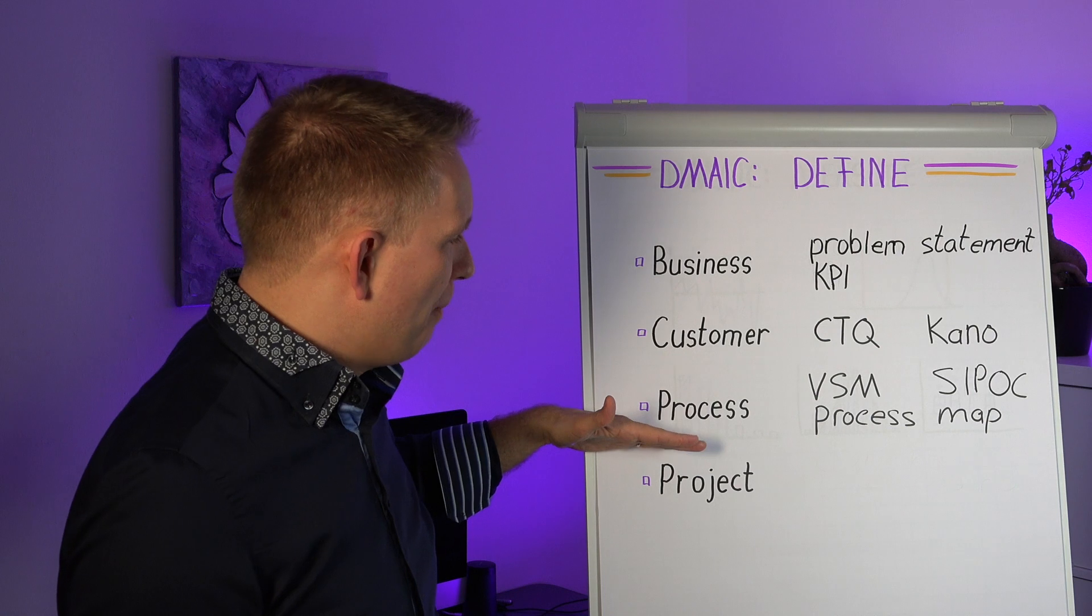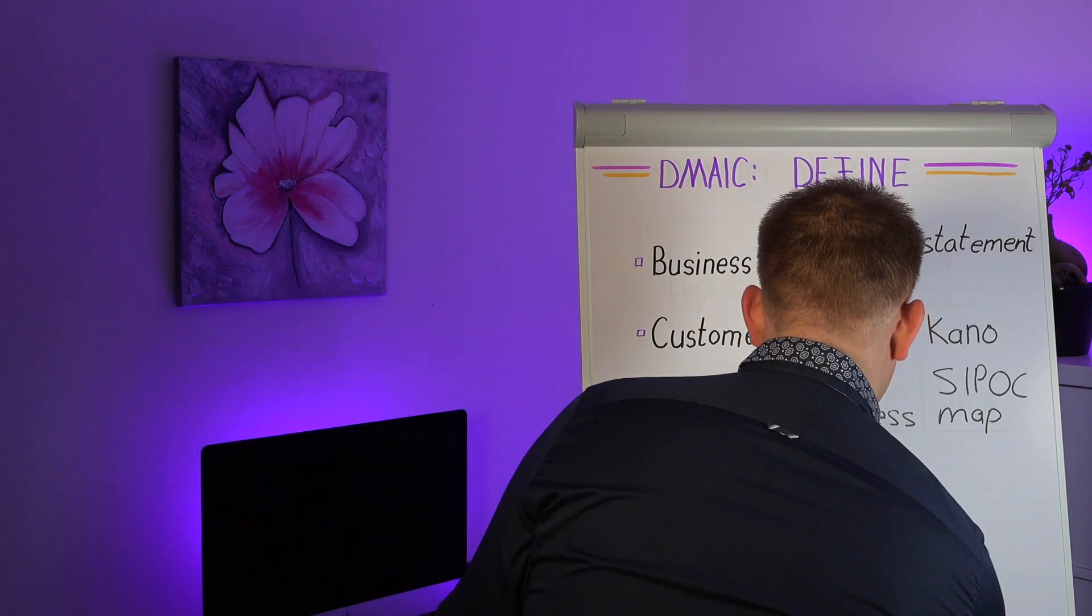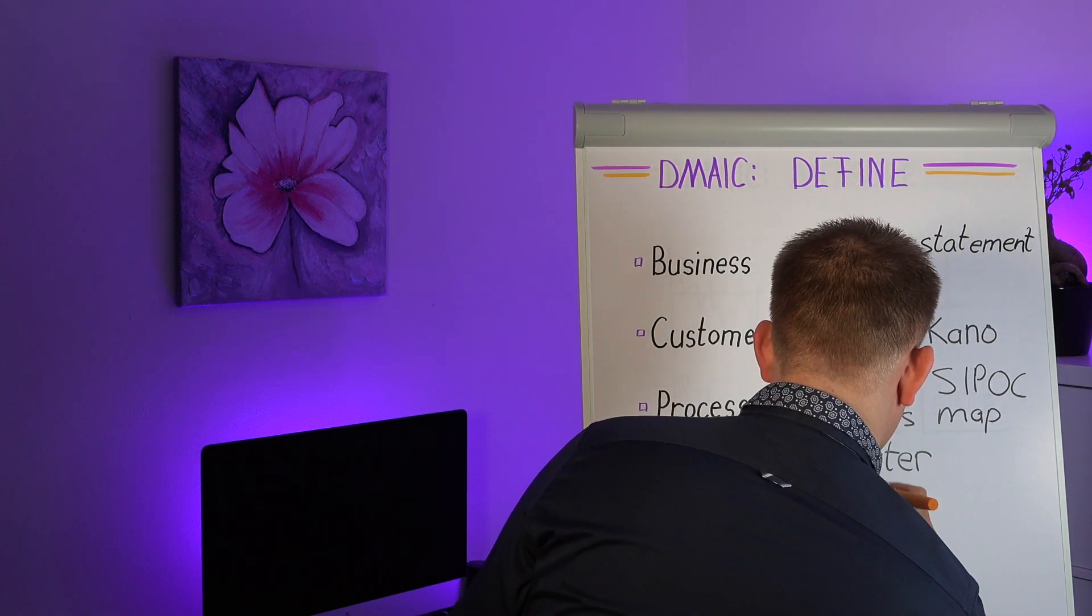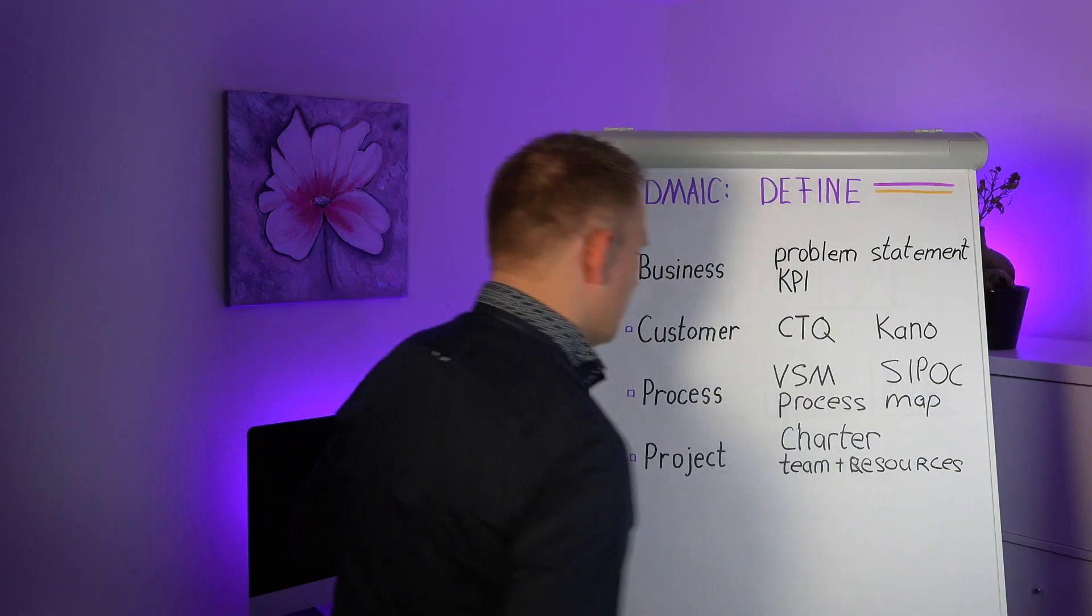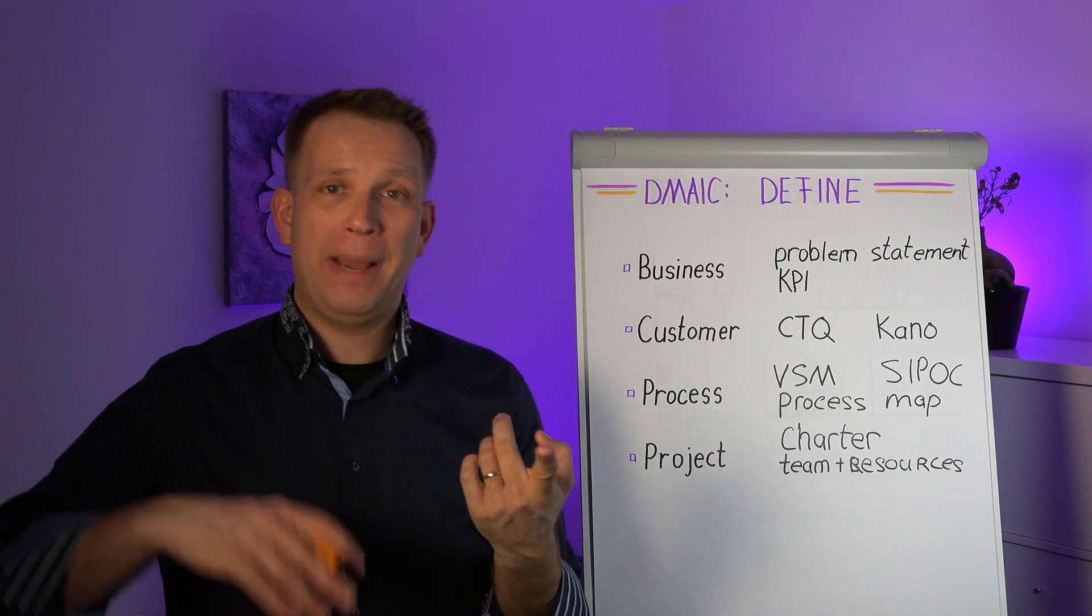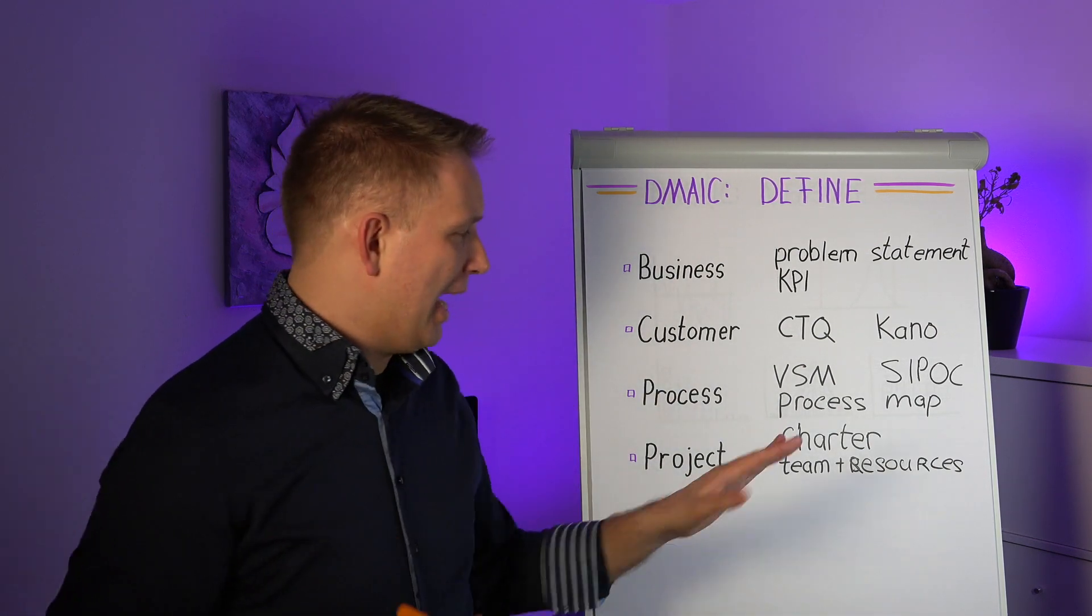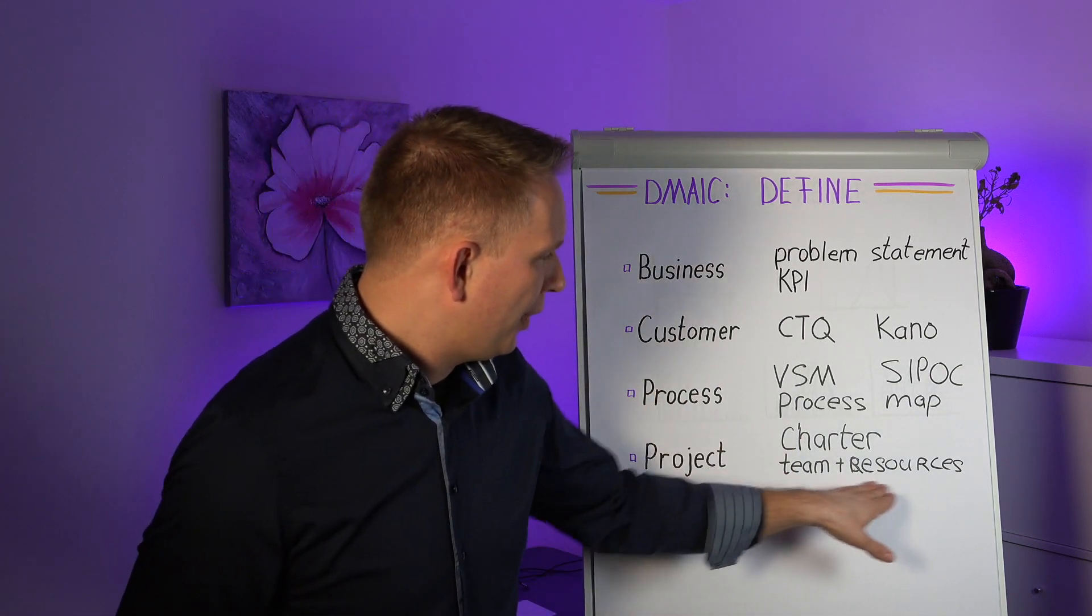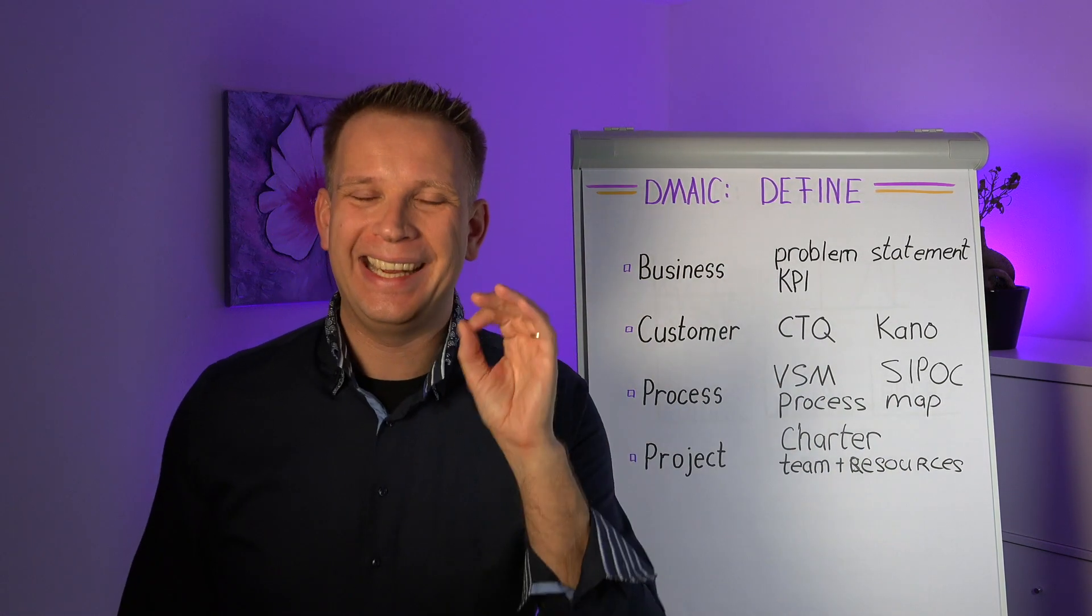And then of course, when we combine all of this, we get to your project goals and the project resources. So we get to the project charter that states what the project is about, how far we want to go in the KPI, who's in the team, what resources do we have, roughly a timeline, things like that, who the sponsor is. So put your team and your resources in that charter as well. Define it here.